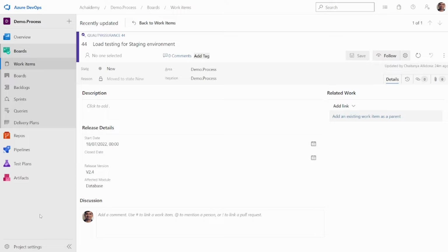So the scenario could be your business analyst or a product owner creates a work item that gets assigned to your scrum master or a tech lead, so that he or she then decides to assign it to other developers, or plans to pick it up in the next sprints. This will ensure requirements or features are not missed, as otherwise it will not be in the backlog and people may not be aware.